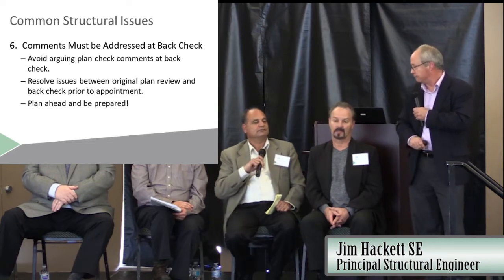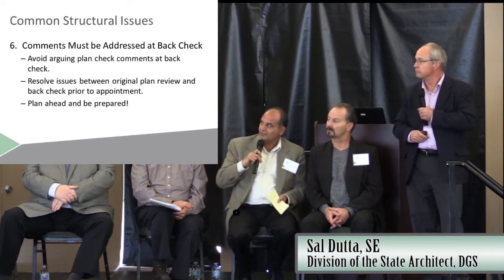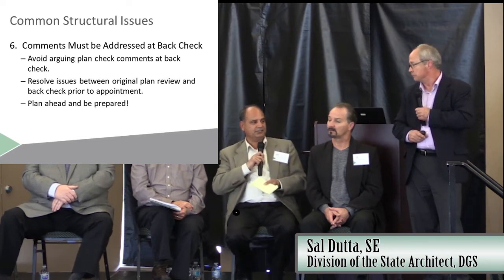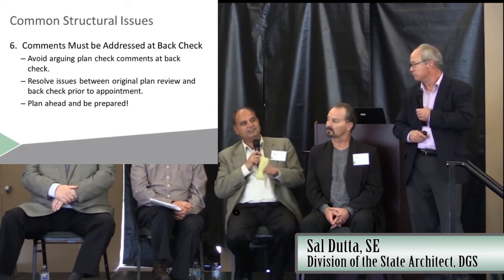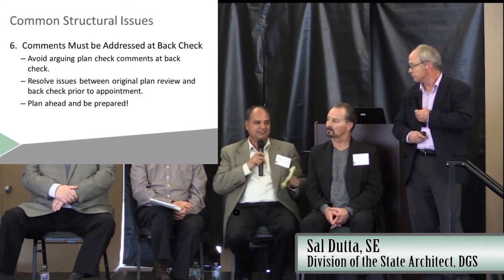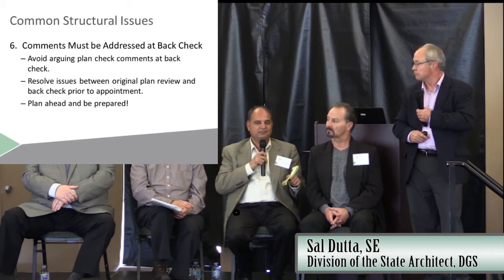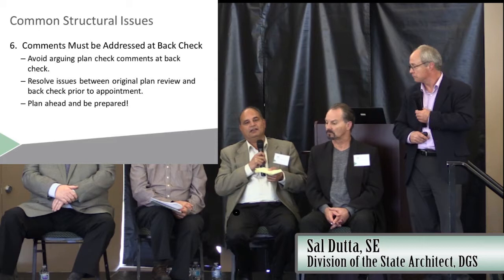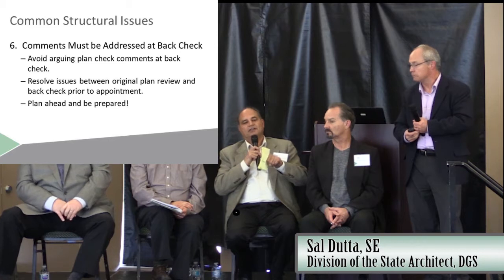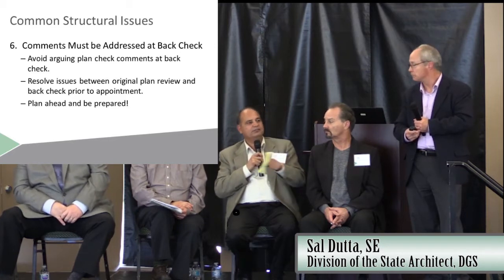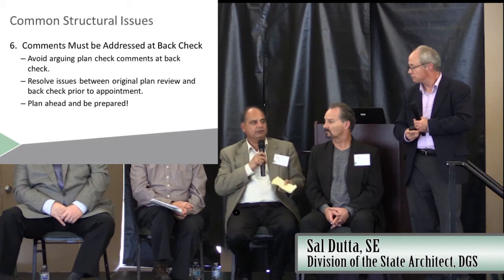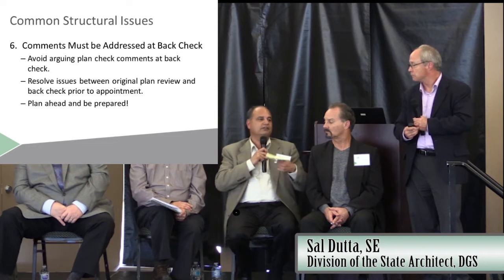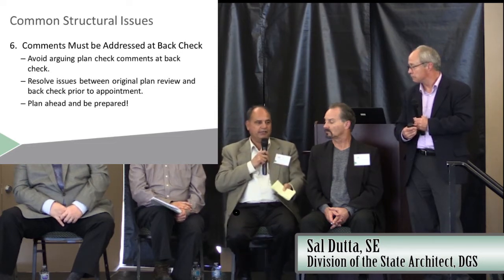But Sal? Yeah, I want to add on. Most of the challenges do come in the back check room, especially when the project is either behind schedule or already gone to construction. Everybody wants to get this approved like yesterday. If there were many issues during the plan check, pay attention to the notes we put on the cover sheet saying plans must be submitted 2 weeks or 1 week prior to the back check. Part of the reason is that the plan reviewer wants to go through the numbers again, and doesn't want to be doing it while in the back check room.